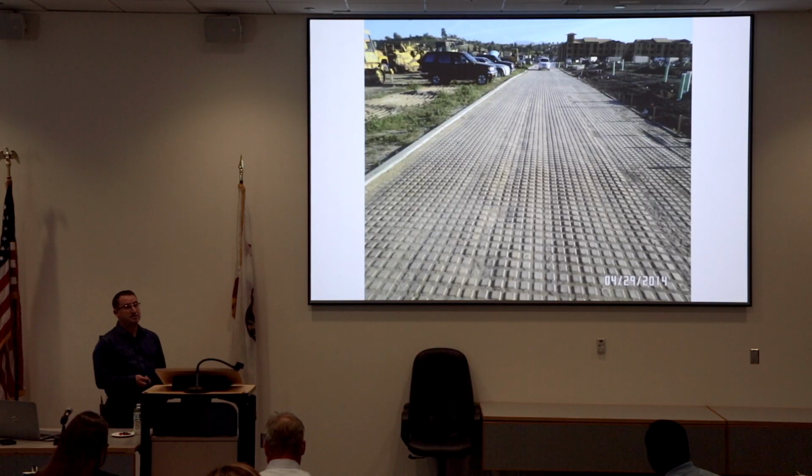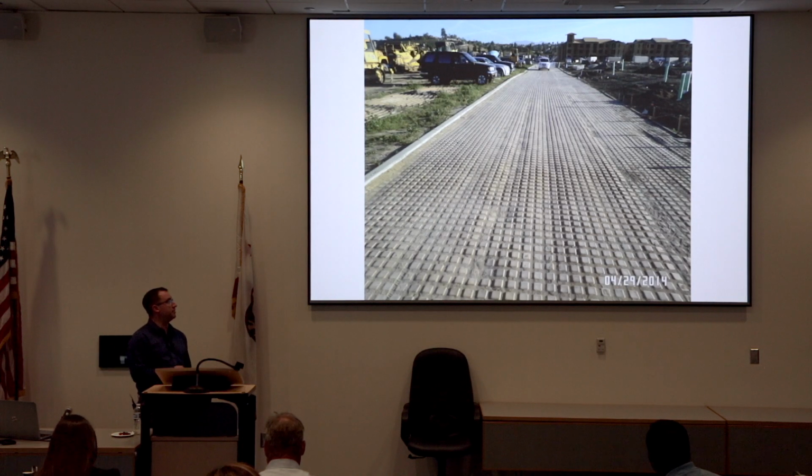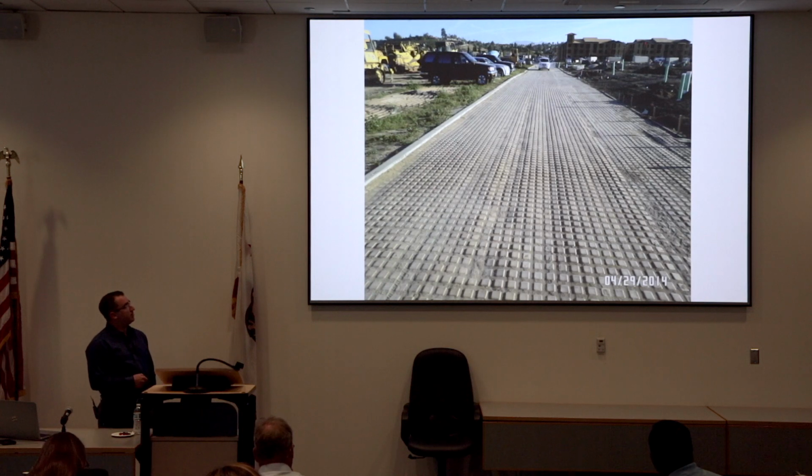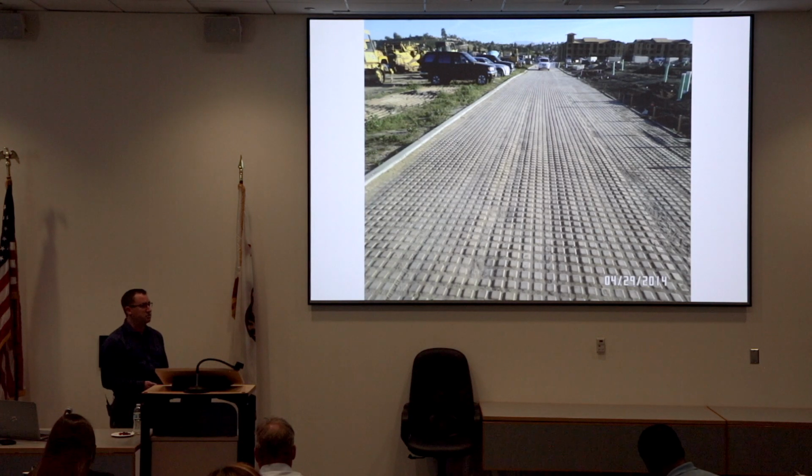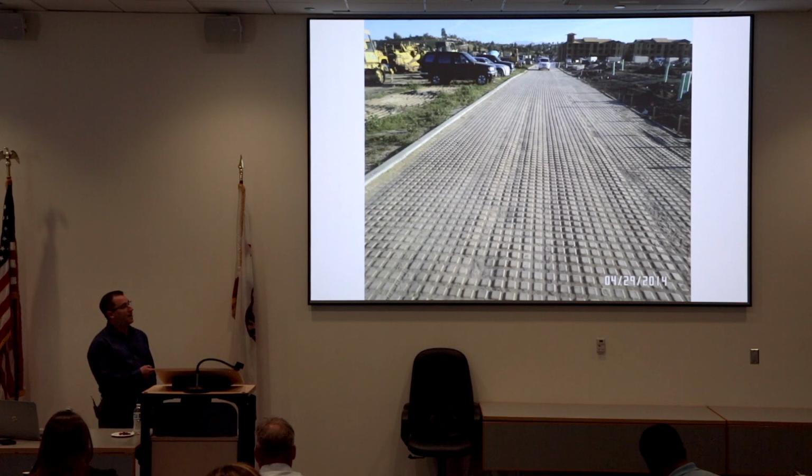we needed to have access through construction to be able to get out there to where it was an outlet, because the construction time frame on this apartment complex was supposed to be about two and a half years. It ended up being closer to 3.5 years. But we couldn't not have access during that time.